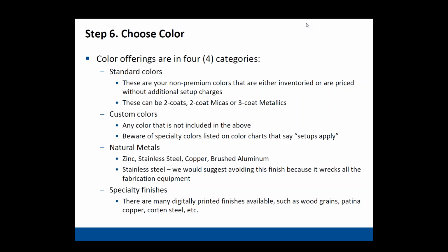You have custom colors, and well, let me back up on the standard colors. Several of the manufacturers offer a large color palette in their standard brochures. The colors that are non-standard will still be priced in most instances like a custom color. So that brings us to a custom color. Any color that is not included above, and setup charges will apply to these colors.